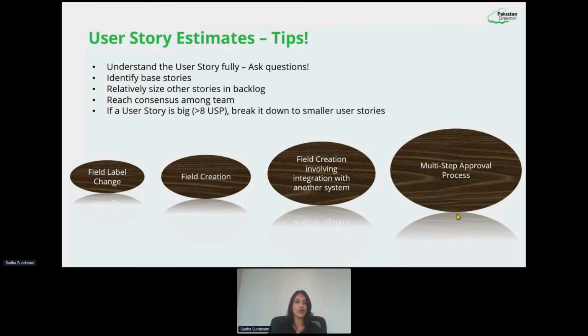Just to give you a visual example in the real Salesforce world, again, for example, your field label change was your smallest ever effort that you've ever done. Just renaming your region to zone with no values changed, nothing changed, just in one layout. Then probably a new information capture, which might involve a field creation, could be much more complex, or more magnitude of work, from a story point perspective, bigger than your field label change.